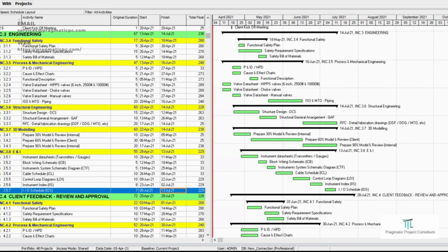We can see the disciplines and the packages, completed with the detailing that we are showing here in the WBS. Under the WBS, this is very clear. We should not miss even a single activity, because if you miss something, then later it will be very difficult to add or connect accordingly. So better you list properly and give more detail in the activity listing.